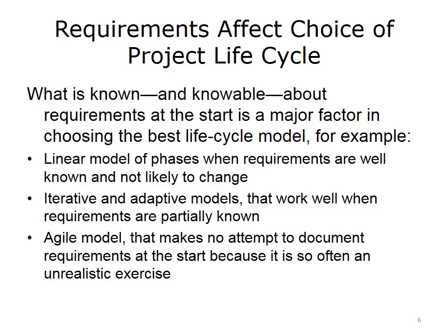You have a strong influence in your role as a project manager in identifying which project lifecycle model to use. In a large, multi-year healthcare IT project, you may use more than one of the life cycles. For example, you may use the linear project model for the overall project, knowing that you will start in this area and end in a different area. But then you may use the iterative or adaptive model for a small piece of the project, such as an infusion calculator, where you are not sure exactly how it is going to work and how it will affect the overall process.